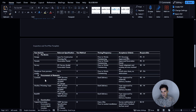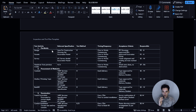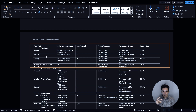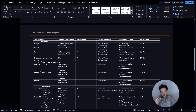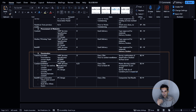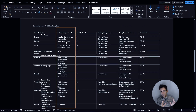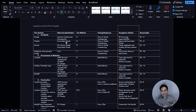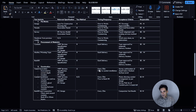ITPs follow a specific structure where you have the test activity — the series of steps to complete the construction work. You might have pre-works checking drawings are correct, making sure permits are in place, checking that the works have been surveyed, and the procurement of materials. Against each of these activities, you have the specifications that apply, what test method you're going to use, how often you're going to do the testing, what the acceptance criteria are, and who is responsible.